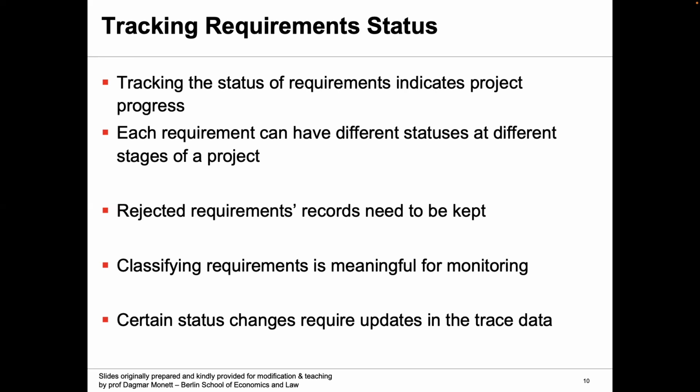And the rejected status lets you keep a proposed requirement available for possible future reference without cluttering up a specific release of the committed requirements. So just by putting the rejected requirements in a separate record, you also help in decluttering the document in which you're working on your committed requirements, right? Okay.